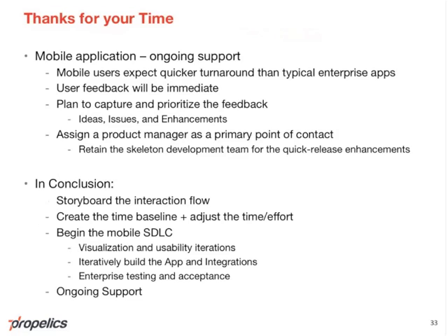So in conclusion, I just want to thank you for the time today. I'm going to hand it back over to Adam in a second. The last piece: a question came in when we did the registrations about ongoing mobile application support. We touched on it, but I want to emphasize this. The feedback will be immediate. Plan to capture and prioritize the feedback. There'll be great ideas, some issues, some enhancements, but you'll want to assign a product manager or application manager to front that, and a skeleton development team so that you can turn around any enhancements in a quick phase 1A response.